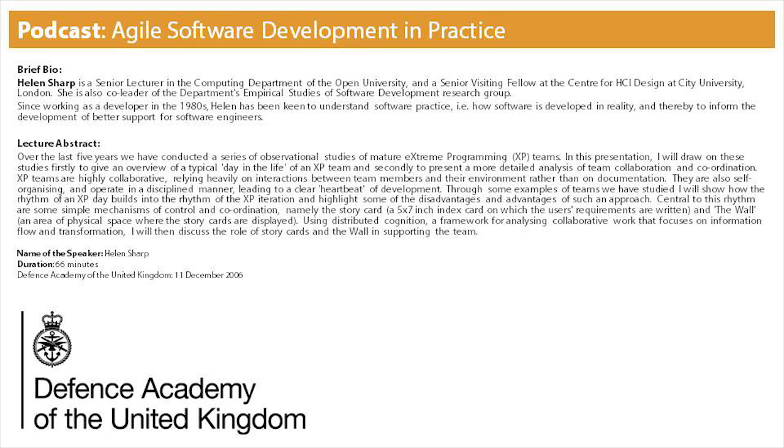If there are things that have to be done on the infrastructure, so for example, Team A had to move to a new server while I was with them, well, the customer doesn't know anything about that. The customer's not interested in that. That's a developer level issue. So what I've just said contradicts what I said before about it being customer visible functionality. There are these discrepancies between what people are saying and what people are actually doing in reality. They find out that there are these problems. So if you read the textbooks, most people will say that it's the customer that does all this stuff. But in fact, developers get involved as well, and they do come up with stories themselves.